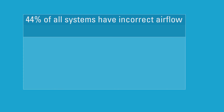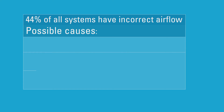Surprisingly, the airflow is incorrect in a lot of homes. One study actually found that 44 percent of all systems evaluated had incorrect airflow. And this might happen for a few reasons, all caused by a difference between the original design and what was actually installed in the home.